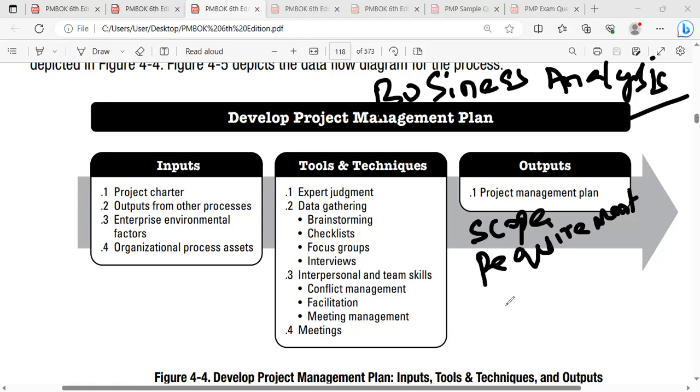So the requirement management plan will give you greater information on how you need to collect the requirements, what kind of tools you're going to use to collect them, the roles and responsibilities, and what technique you need to perform to gather the requirements. So if I'm not wrong, many predictive projects are going to use their estimation engineers or tendering engineers, right or wrong? Guys, correct me if I'm wrong. In the adaptive projects, the person who's going to collect the complete requirements for a product will be the business analyst. So who will be the person taking the roles and responsibility in the predictive projects?